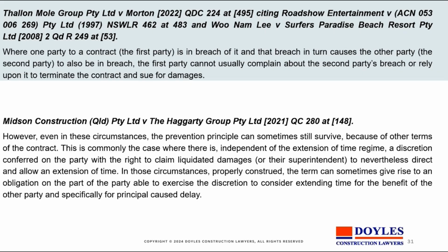So again, you've got the Mole case versus Morton, where a party is in breach of an obligation, and that breach in turn caused the other party to also be in breach. The first party cannot usually complain about the second party's breach. So again, just simply reinforcing that important principle.